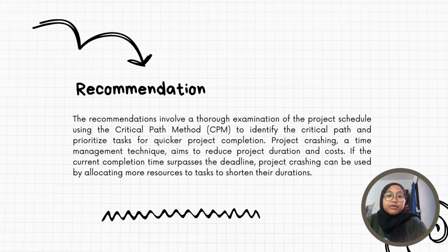So the next is the recommendation. The recommendation involves a thorough examination of the project schedule using the critical path method to identify the critical path and prioritize tasks for quicker project completion. Project crashing, a time management technique, aims to reduce project duration and cost. If the current completion time surpasses the deadline, project crashing can be used by allocating more resources to tasks to shorten their duration.